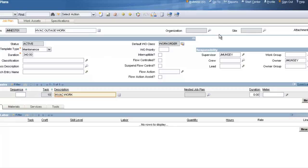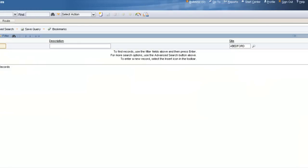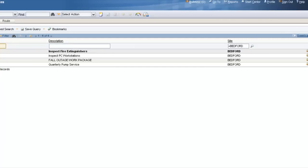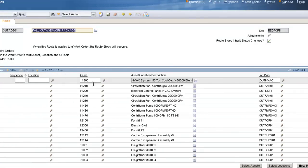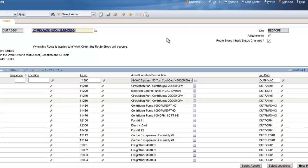To look at another functionality, click on Go To, Planning, and then Routes. Routes are a very simple application — it's a list of different assets or locations, and you can associate either the same job plan or different job plans to each one. I've listed 17 different assets, and for each asset I gave it its own individual job plan. In Maximo 7, you have options where the route can either create child work orders or just a work order task.